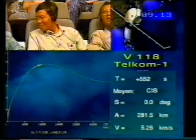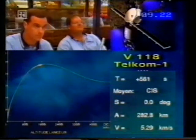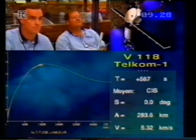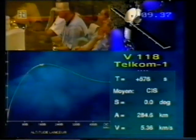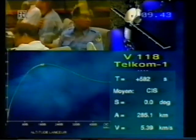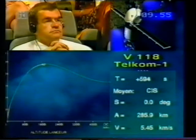Well, let's talk a bit about our postponement, because it was not all bad. As we heard at the beginning of the broadcast, our 8-day postponement was made necessary by the replacement of a third stage latch valve relay box. What did this involve for the launcher, Rashid? Well, this is our quality assurance program. Following an electrical system anomaly observed during one of the similar third stage engine acceptance tests in the Vernon facility in France, one of the 4 electro valve interface units of that particular engine showed the presence of a metallic particle causing a short.